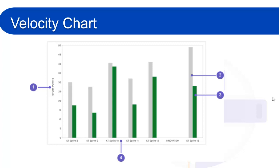The velocity chart is also board-specific, meaning it will only include the issues that match your board's saved filter. As I always mention in my previous videos, all reports in Jira Software are specific to the board's saved filter, so the results of the reports depend on your filters.